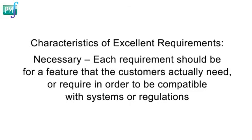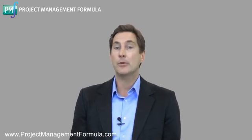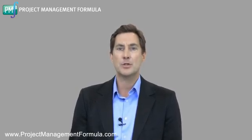Each requirement should be necessary. Every requirement should be for a feature that the customers really need, or that is required for compatibility with an external system or regulations. Excellent requirements are also prioritized. Assign a priority to each functional requirement to indicate how essential it is to a particular product release. Prioritizing is vital because if all the requirements are classified as equally important, it's hard for the project manager to respond to budget cuts, schedule overruns, new requirements added during development, or other factors that require updates to the development plan.